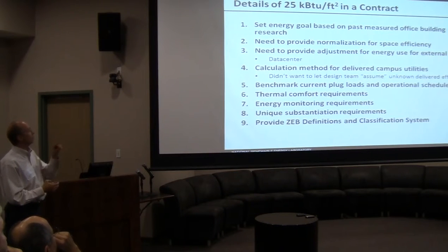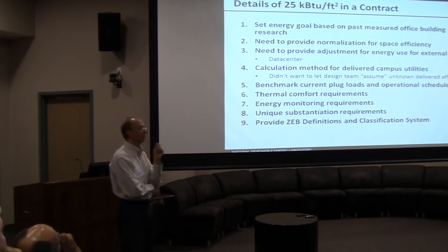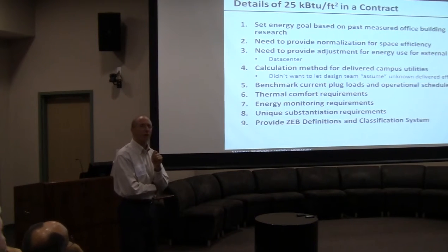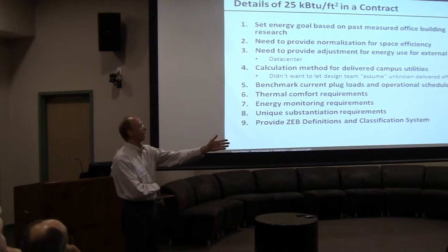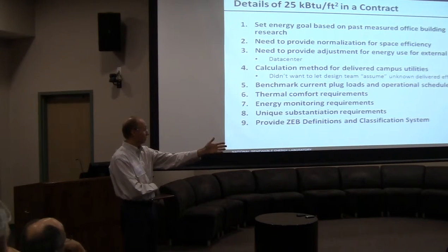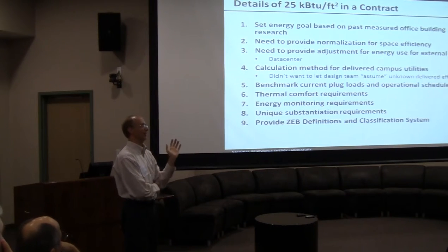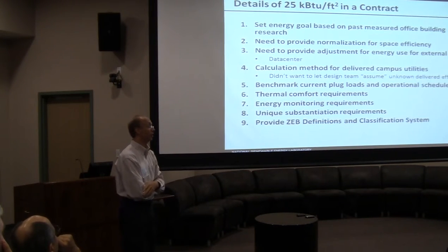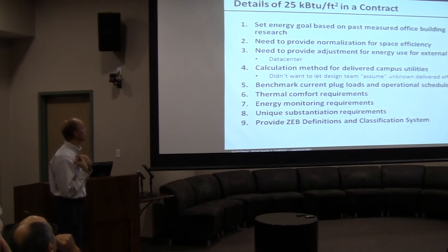We actually went into our old facilities and looked at our plug loads. I'll talk about plug loads because it was a big part of it. We benchmarked those and then set targets for us as an owner for plug loads that we were going to have to hit to get into this new building and meet the objectives. Operationally, we didn't have to get there, right? But we were going to really try hard because otherwise we wouldn't have met the goal overall. So that was something that we took on as an owner risk.